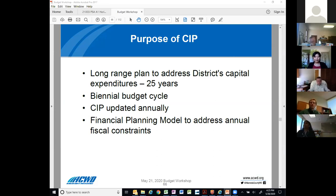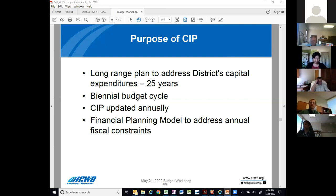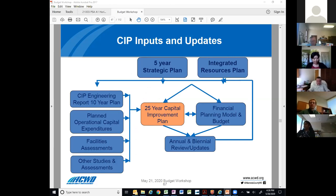In a nutshell, our CIP is a financial representation of the district's priorities, both short-term and long-term. Our long-range plan addresses the district's capital needs and expenditures for the next 25 years. We have a two-year budget cycle that prioritizes our capital projects based on system needs and operational impacts, and identifies funding necessary to implement these capital projects. We also use a CIP database built in-house by our own staff to capture CIP updates on an annual basis, ensuring we capture any variations or deviations in a timely manner.